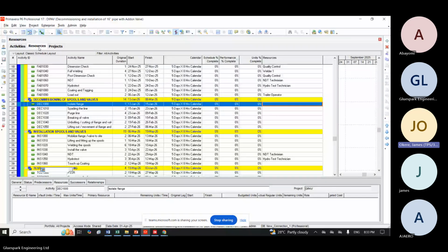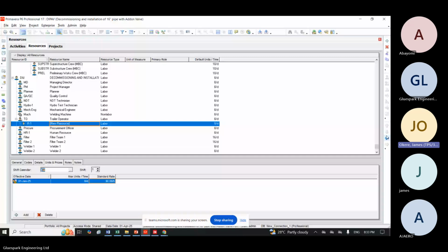Let's start with the painter. I will create a painter now. So if I sit down and plan it, I would have notes of all of them on a piece of paper before starting. So this painter might not be one. This painter might be 2 persons, so I'll make it 16. And I also put how much we are going to pay them. We are paying this painter, let's say, $10 per 1 person per hour.